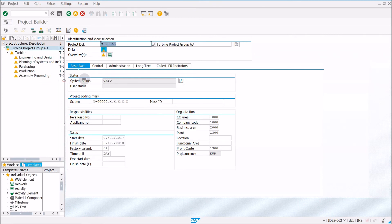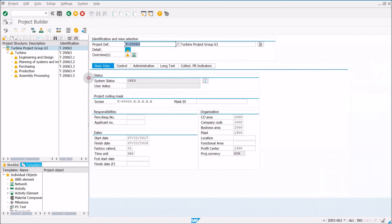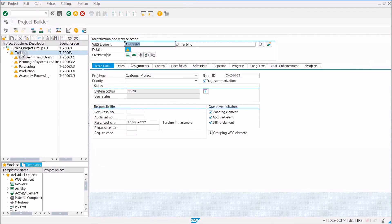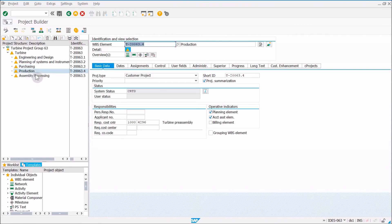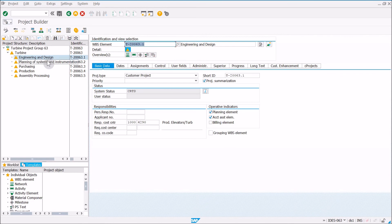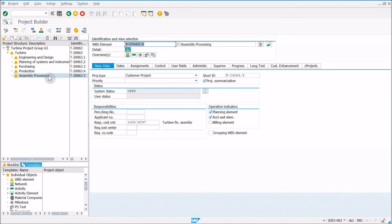So now what we see here is all the various elements of our project. This particular project, we're creating a wind turbine. So you can see here that it's broken down into the five major components that make up that project. The five main pieces of work being engineering design, planning of systems and instrumentation, purchasing, production, and assembly processing.